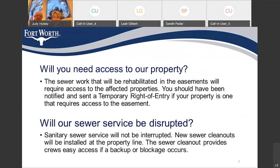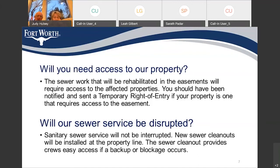Will you need access to our property? The sewer work that will be rehabilitated in the easements will require access to affected properties. You should have been notified and sent a temporary right of entry if your property requires access to the easement. If you've received a temporary right of entry in the mail and haven't already done so, please sign and return it to me, the project manager. This will help to protect you, the property owner, and the contractor alike.